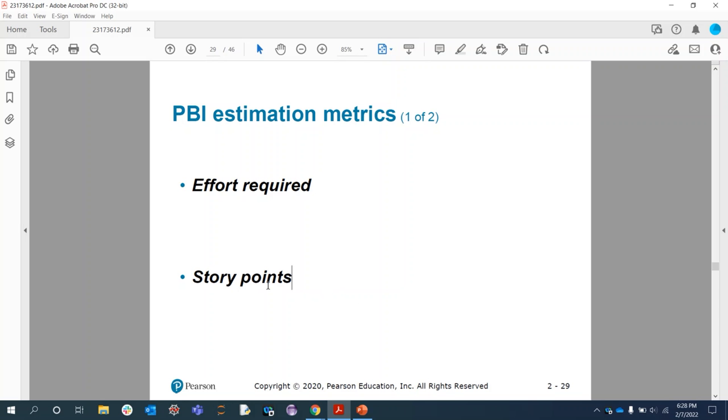The purpose of a user story is to articulate how a piece of work will deliver a particular value back to the customer. User stories are just a few sentences in simple language that outline the desired outcome, and they don't go into detail. In an incremental way, the requirements are added later after thorough discussion within a team.